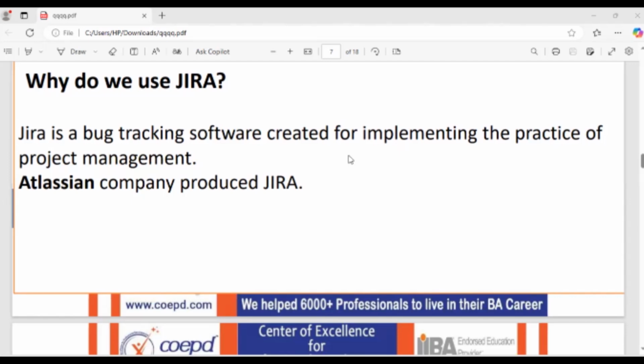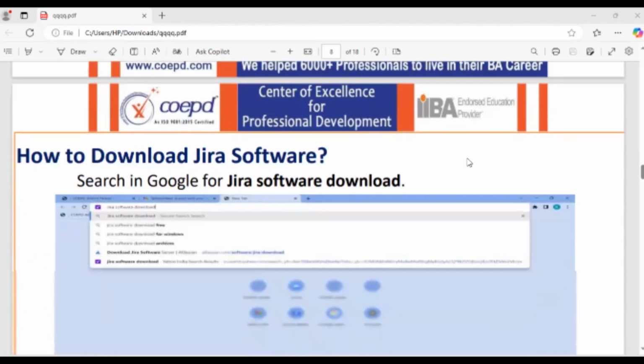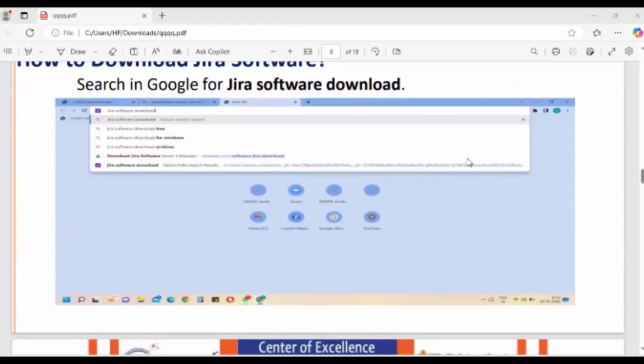We will develop and deliver 10% to the client. In that 10%, we need to identify which user stories we are going to develop. How do we identify them from the product backlog? With the help of these BV values and CP values we will identify and prioritize them.